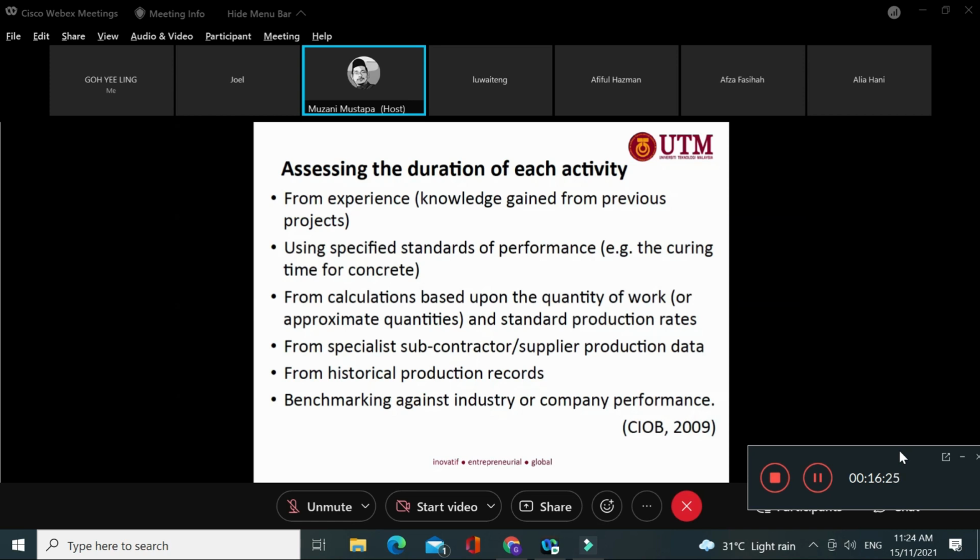So in the tender document you look at the time duration set by the client, mentioning how many days or how many weeks that particular project should be completed, the expected date for completion, right? So it means the contractor who buys the tender, the tenderer, basically does not dictate any time frame. Normally for big projects, the client has already set the time frame for that particular project.